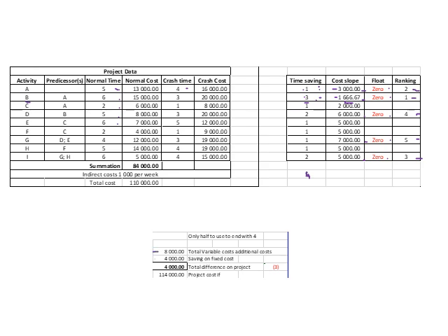And I think I've just cut off a section here where I actually just calculated that area, or that calculation of the total amount added. So it's 3,000 and then 3 times 1,666.67, which amounts to 5,000 Rand. So it's the 5,000 plus the 3,000 to give us 8,000. Okay, and then the reduction in our fixed cost is just 4 times 1,000.